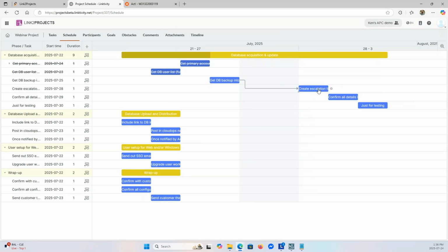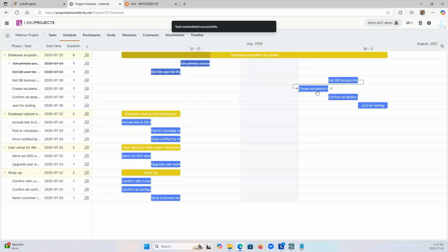Okay. Now there is a Gantt process that makes this quite useful for scheduling, because if I move this ahead of it, this is supposed to then automatically jump so that it stays ahead in the scheduling. I obviously can't have the predecessor take place after the successor.